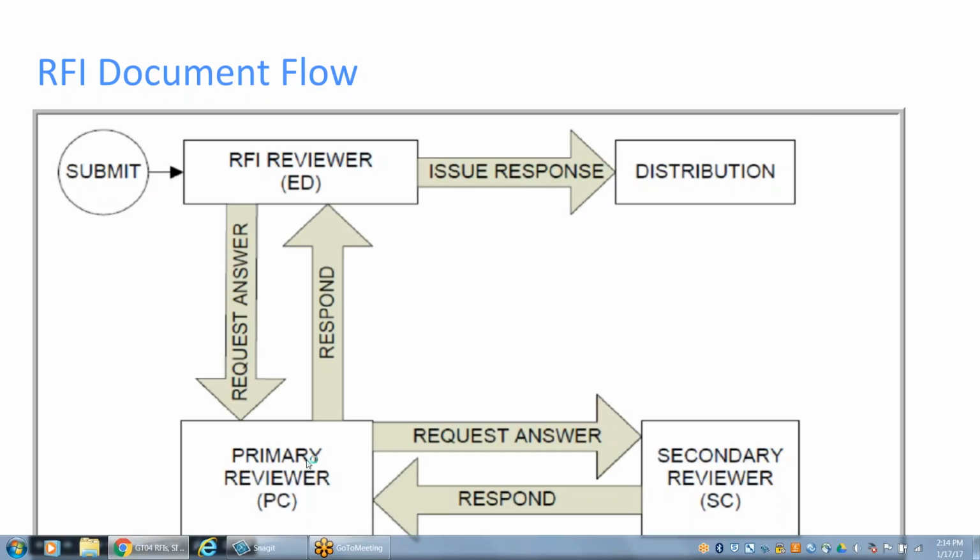We wait a couple of days depending again on the RFI priority, and if your external team is not collaborating with you on Gate 3, then you wait until you receive an email, and you then go in on their behalf into Gate 3 and you're basically logging in their response. So you have to basically log and manage the RFI on their behalf.